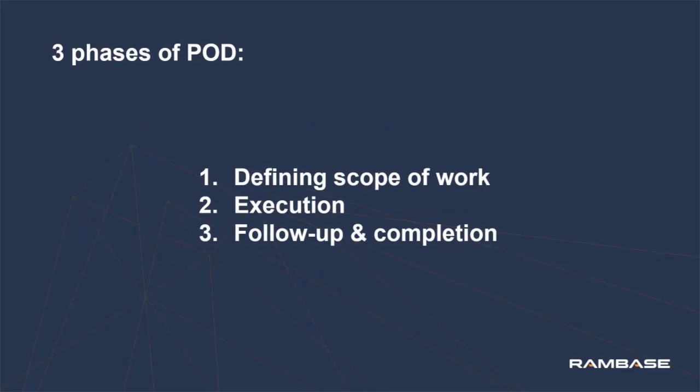The first phase is defining the scope of work, which means setting dates, creating quotes and sales orders, adding estimated hours, materials, and costs. Then you commence with the actual work, where the operator can log hours and pick material. Changes to cost, hours, material quantity, and which material is being used can be made along the way, making it a flexible tool.